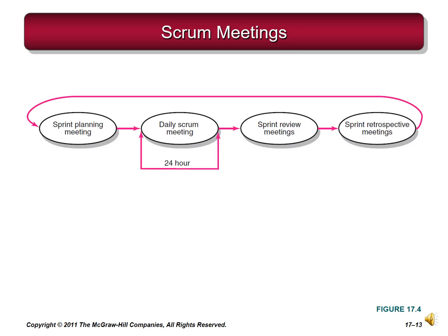Please note that the team is self-managed or self-empowered. The Scrum Master does not assign daily tasks to team members. The team decides amongst themselves. The Scrum Master's role is to see that the Scrum is running correctly. They are not the master of the team, but rather the master of the process.